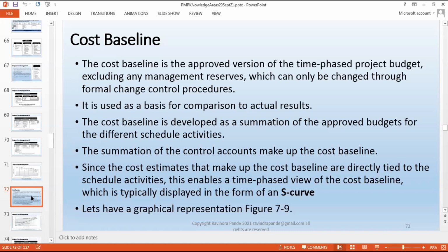If they decide not to allow the reserve, it means the project is in the red, and then it can be closed proactively by the organization's top management. If you are allowed to use the reserve, it means that you are utilizing the project resources at their maximum capacity, and still the cost estimate has not been correct to a practical level. So you might sit down again and revisit the estimate, in terms of schedule, in terms of the timeline for a resource and those things. And you arrive at a figure where you normally play within the budget.